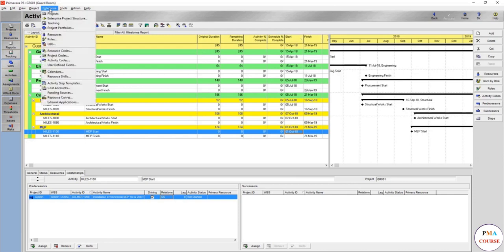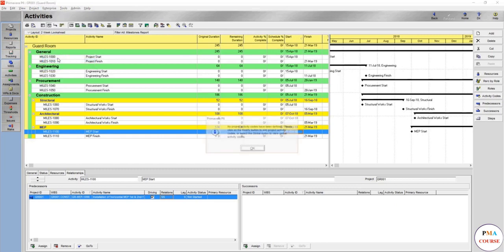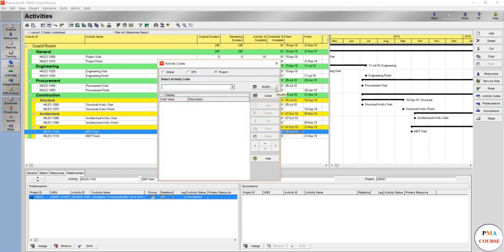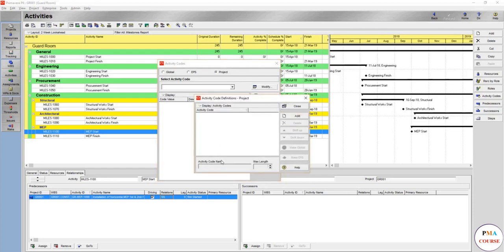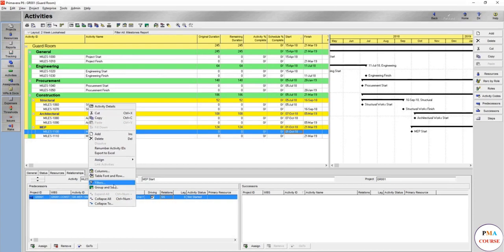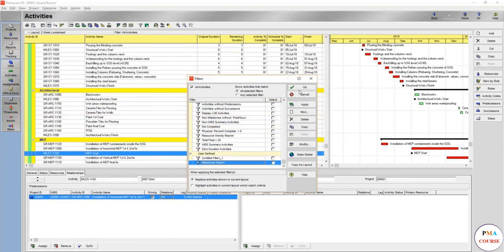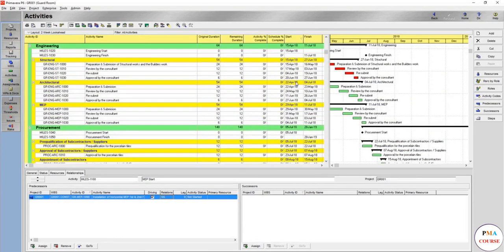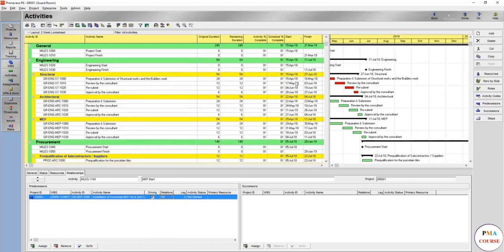To create activity codes, go to Enterprise and you'll find Activity Codes. No project activity codes have been defined — click the Modify button to add or select. Zero activity codes are there, so press Modify. Activity codes are used to define each item by the same material, subcontractor, supplier, discipline, or trade — whatever you want to group together. The more activity codes you create, the better, because you can filter and use them whenever you want.